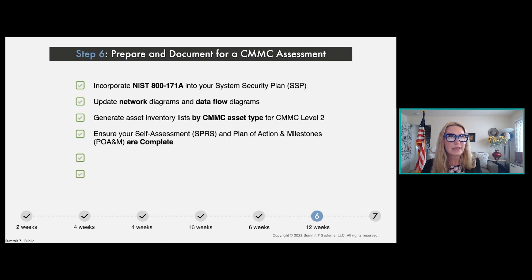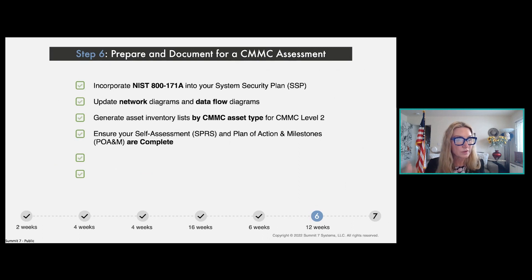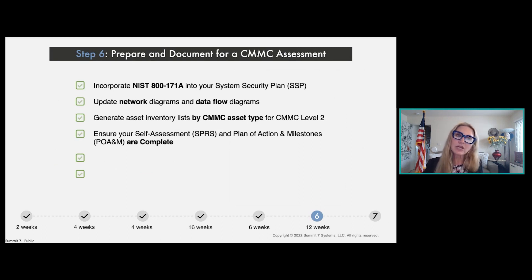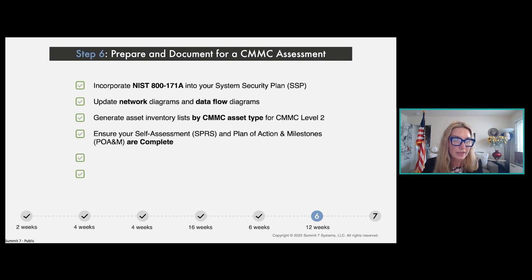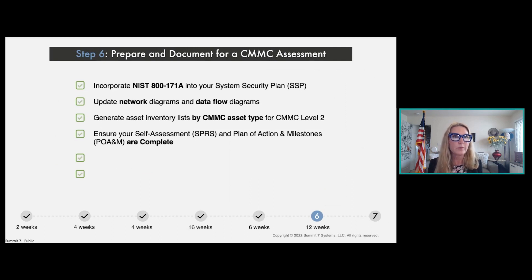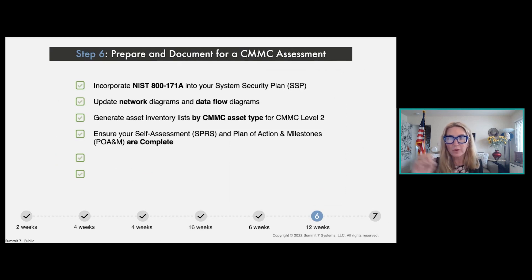The next part of documentation is the self-assessment report you've completed, with the corresponding score uploaded into the SPRS system. Each time you go through the self-assessment process you're likely to identify things you still need to improve or completely remediate before your actual assessment. Those items go on what's called a POA&M — the Plan of Action and Milestones. You want to have all those POA&M items checked off, though there are a couple of exceptions we'll discuss in the next step.